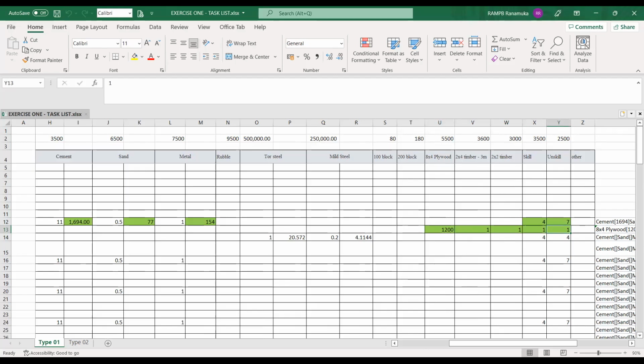When you give the resource type as work, the max units and rate fields become active. Under that, include how many labors you have, for example 50. Then for the rate we can give 3000 or 2000, and we can give that resource.